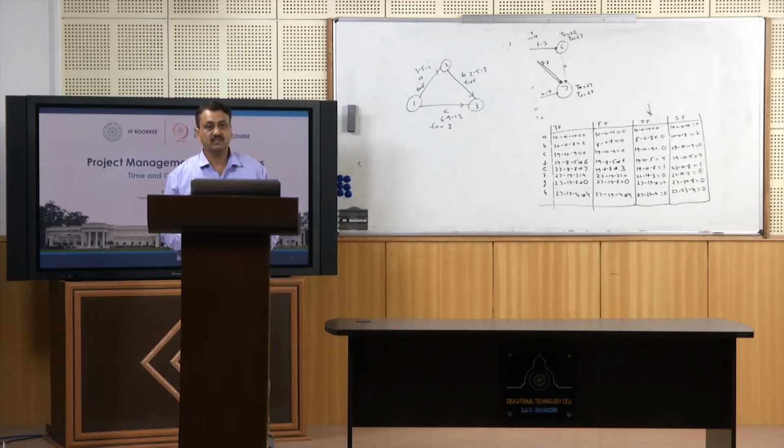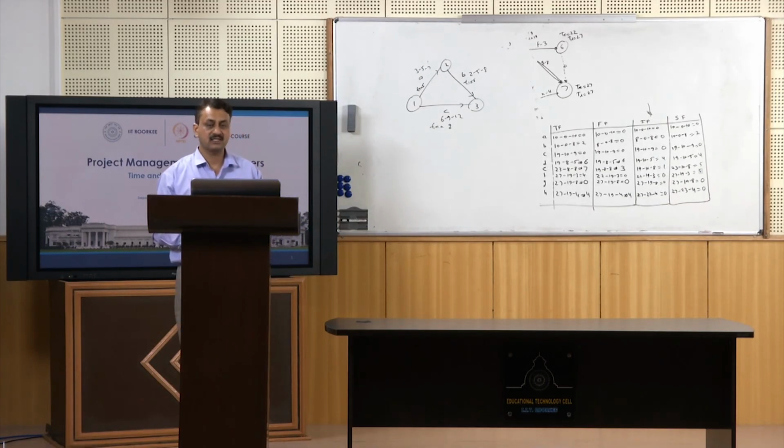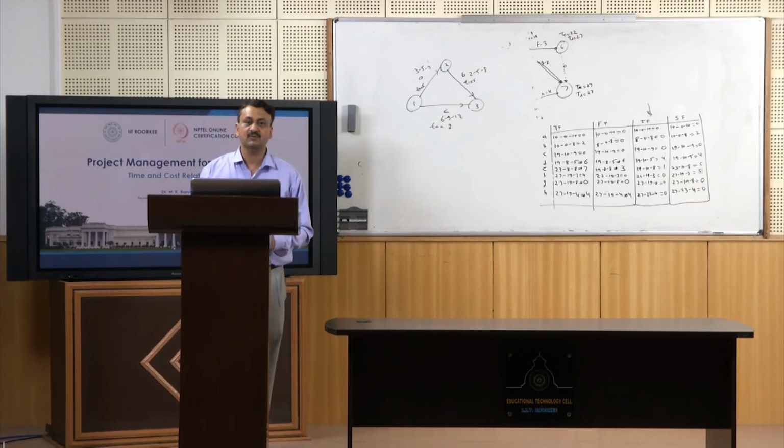Then we have seen, of course, simulation of activities, and it was quite a hectic task, but since you have got computers, you can write a program and simulate duration of an activity thousands of times, so that you will have a precise time estimate.